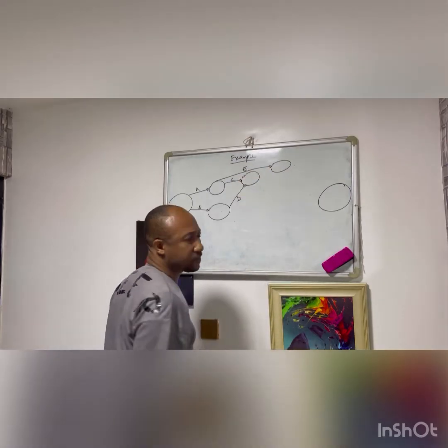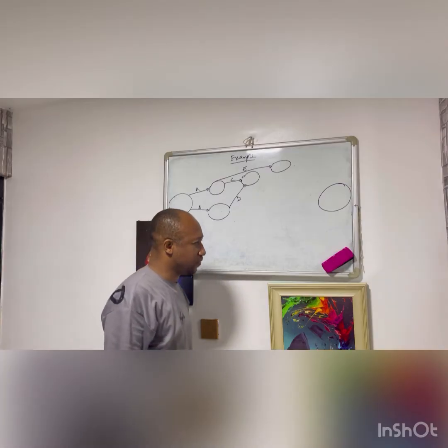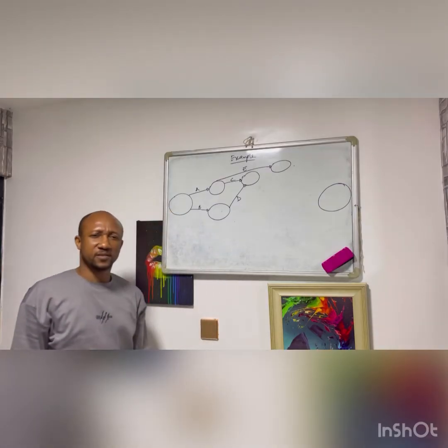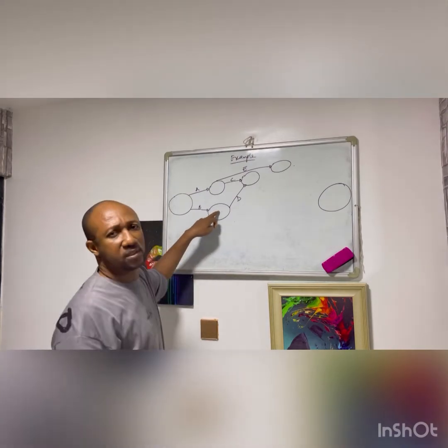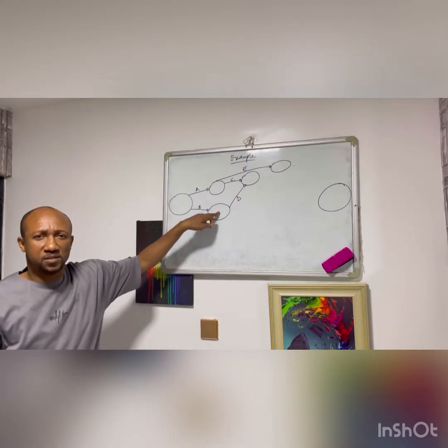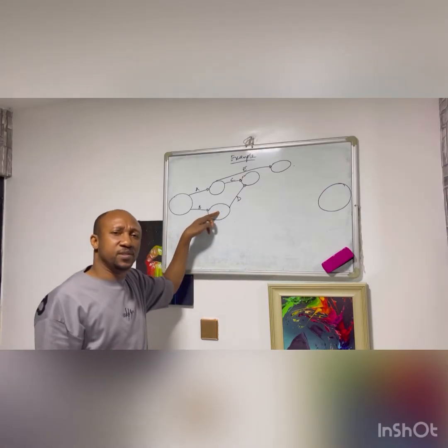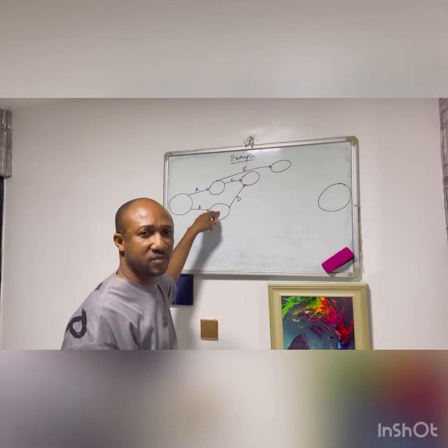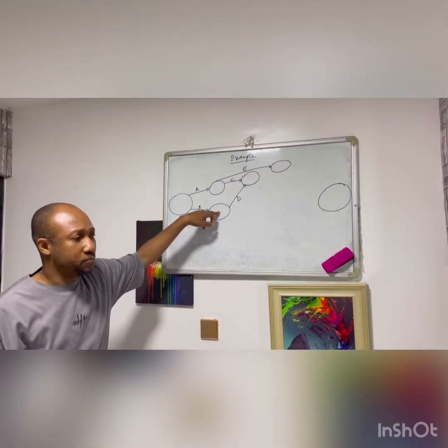Activity E that way. Then the next event for me to draw is activity F. Where will activity F start from? Activity F will start from where activity B ended, because activity B is the preceding activity of activity F.